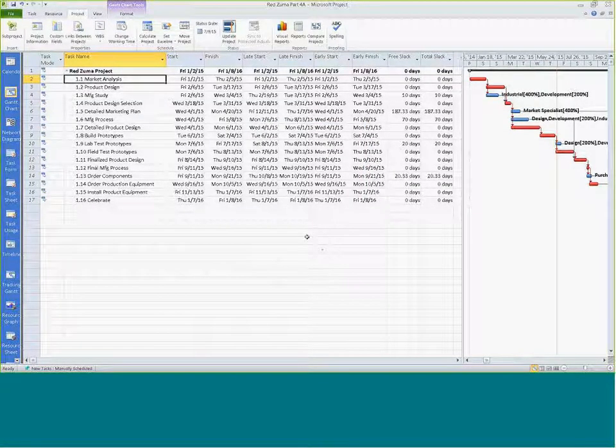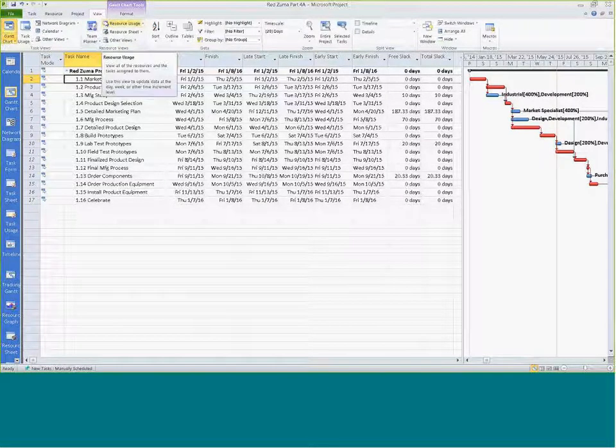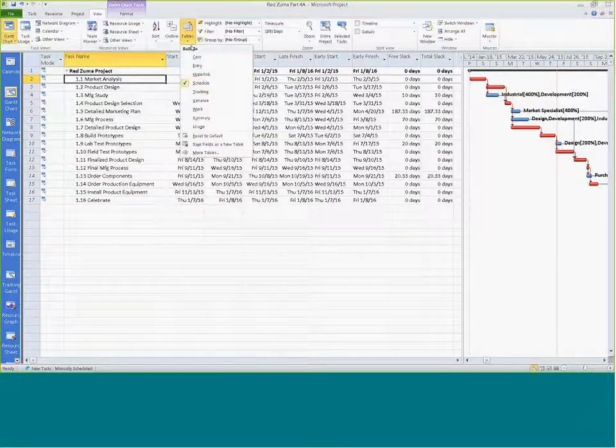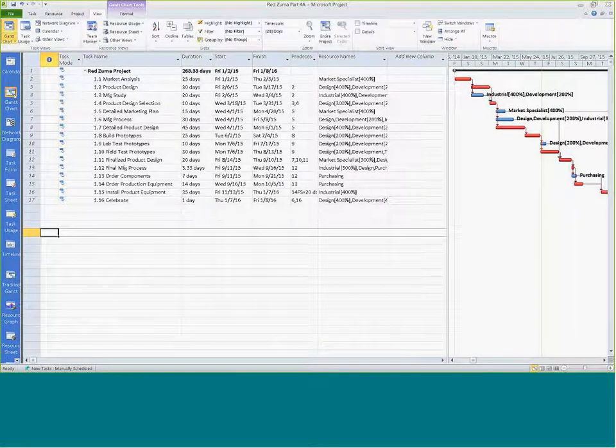Now, remember when you're working in Microsoft Project, we created our project in the Gantt view. As a matter of fact, I've changed this a little bit on view. We did it in part A, or 2A actually, so that our table was in the schedule. But if we go back to entry, this is the table we used when we created this project. And so that's where the Gantt view is used. Now we've saved the baseline, and we'll even save this file.